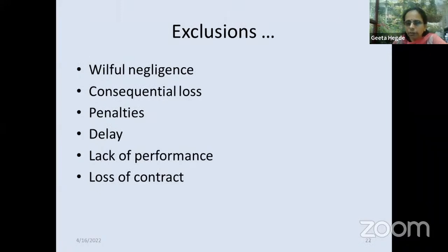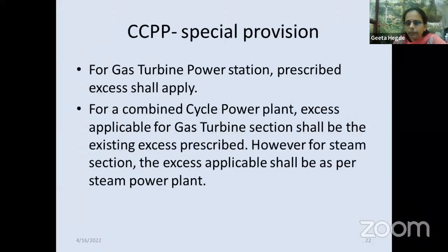Willful negligence, consequential loss, penalties, loss due to delay, lack of performance, or loss of the contract because of delay, are not covered.